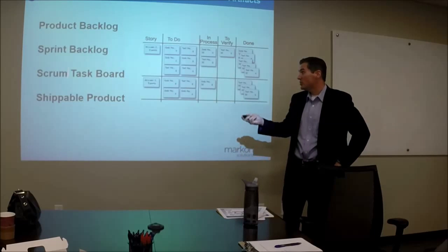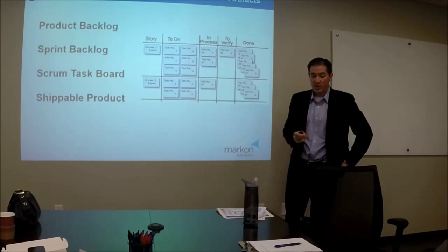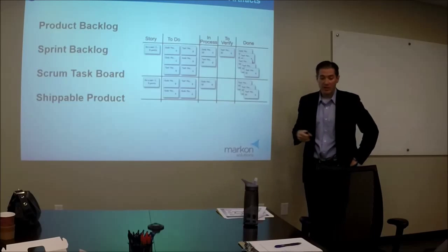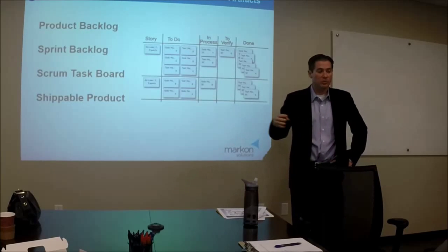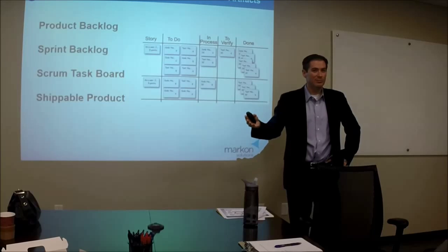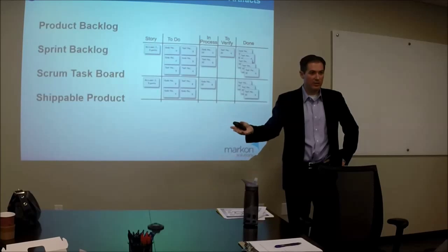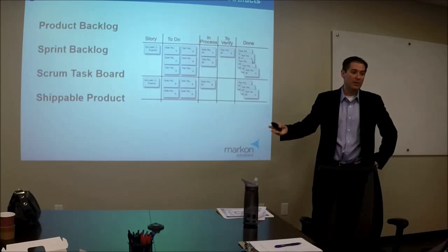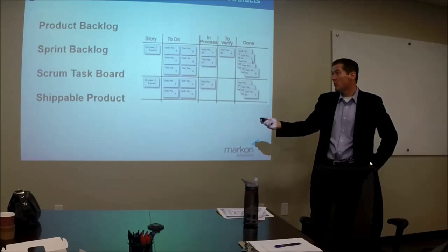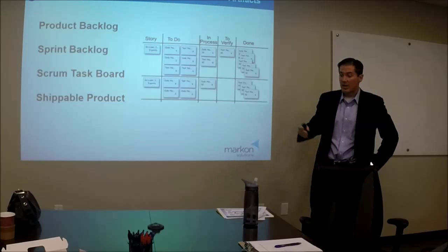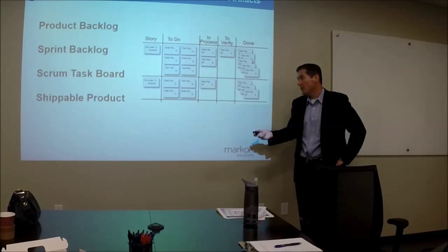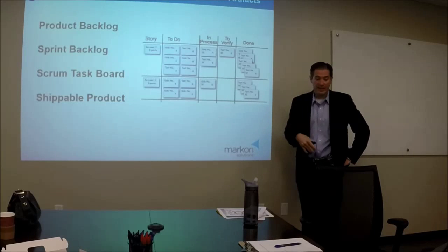So that's why there's two different backlogs. The sprint backlog is what you're working down this time. The product owner is always coming up with new features. The product owner is saying, oh, you know what, the users want it to be green. Well, we didn't know that till halfway through the sprint, so we're going to add it to the product backlog. While we're waiting for the sprint to finish, we'll present this one in the next sprint, and we'll get that feature added next sprint. The sprint backlog is the stuff we're doing this time.